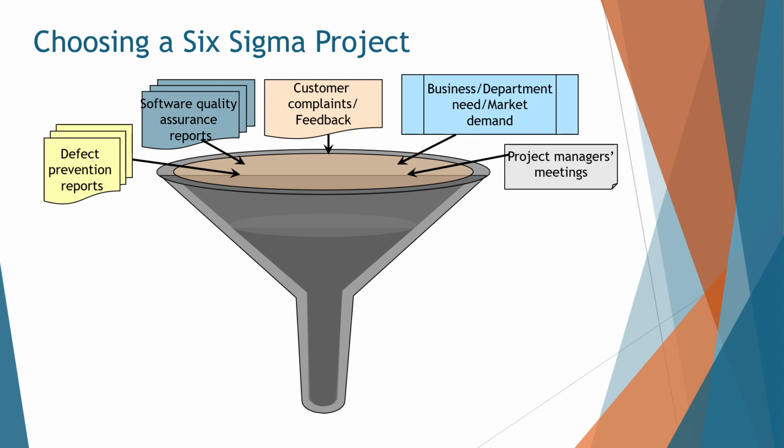When the individual or team is ready to execute the project, a project milestone chart should be developed. The appropriate stakeholders and approvers should agree to the project. This process, beginning with the generation of ideas and ending with the approval, creates a funnel of projects and should be continually managed as a source of improvements.